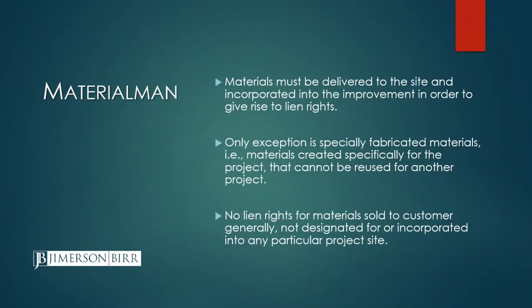There's some other aspects of the materialman definition. The materials actually have to be delivered to the site and incorporated into the improvement to give rise to lien rights. So that means that if materials are just purchased but aren't actually delivered and incorporated, there are no lien rights for those materials. The only exception to that is the term known as specially fabricated materials.